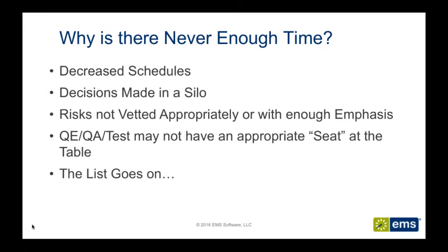When those decisions are made in a silo, we tend to have to play catch up, and sometimes we inject more work simply by asking the right questions, that if we had that appropriate seat at the table earlier on, we would have actually had some time spent. So if we don't have that appropriate seat at the table when all of those meetings kick off, those decisions tend to be made in a silo, and the testing activities aren't accounted for appropriately. A lot of times we see that risks are not vetted out appropriately or with enough emphasis.